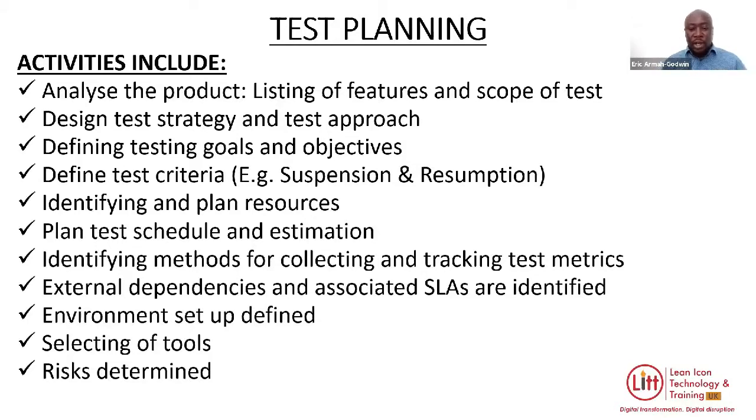And if I was working in testing, depending on Agile or wherever, I would make this document. This document has to be part of my test entry criteria. If this is not ready, that depends on the company's policy. If the organization's policy says that the test plan is an entry criteria for any testing activity, then it has to be ready and signed off before testing activities begin. Mm-hmm. Before execution begins. Yeah.